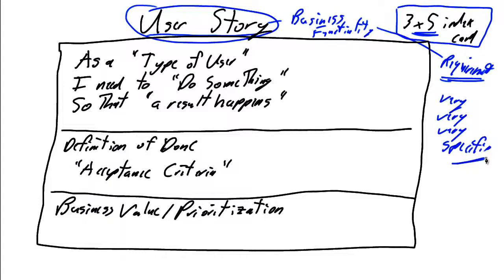To focus the development of our user stories, we typically have a refined, defined format: as a type of user — for example, as a warehouse clerk — I need to do something. I need to find a product in the warehouse, so that a result happens — I can ship the product to a customer.